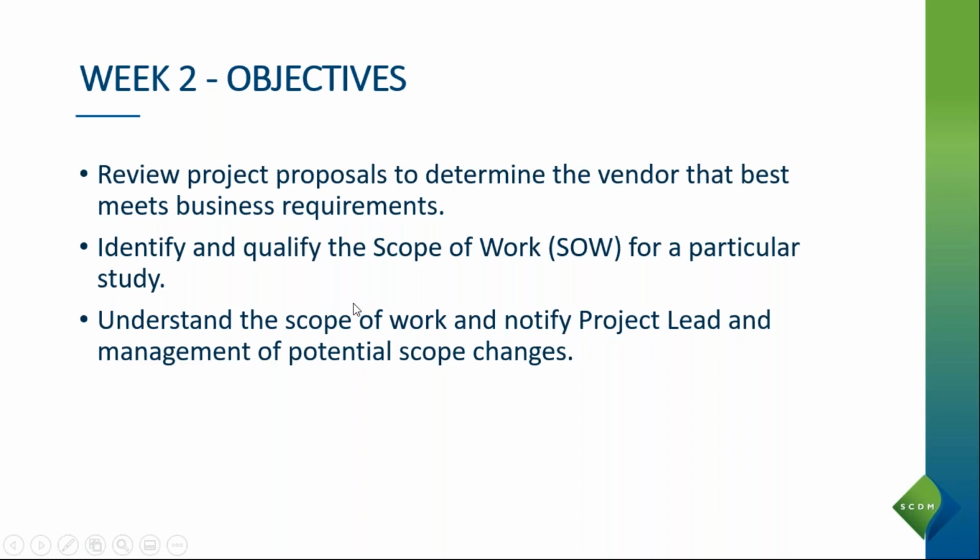So understanding the scope of work is also important. Why? Because if everyone knows exactly what has to be done, by whom, and when it has to be done, then you avoid problems. If the scope of work is not very clear, you might have some delay, some kind of miscommunication, which can delay the implementation of the project. And if there are any changes, because a platform is evolving, a platform can be updated or have a new version, how are we going to implement these changes for an ongoing project?